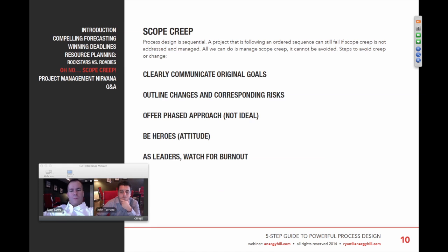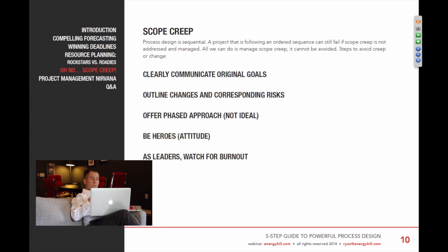In some cases, it'll figure itself out. If not, and there does need to be change made, or creep is occurring, then you need to outline those changes and work with the internal team and get their feedback on the corresponding risks. Some of these changes might mean deadlines are going to have to move, and they can't. And all of a sudden, here's the plan for what's going to be done.